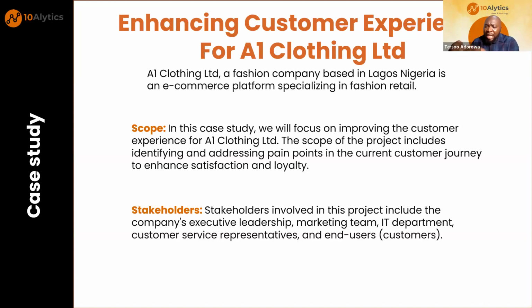Let's look at that customer journey, and it is based on what we have there that we are going to say, okay, let us change a few things to be sure that we have a better customer journey that will enhance customer satisfaction. So the scope is majorly around the customer journey and customer satisfaction. Anything that doesn't have to do with what we just read out is not in scope for this project, right? So we define exactly what we are going to do to achieve the enhanced customer experience for A1 Clothing Limited.